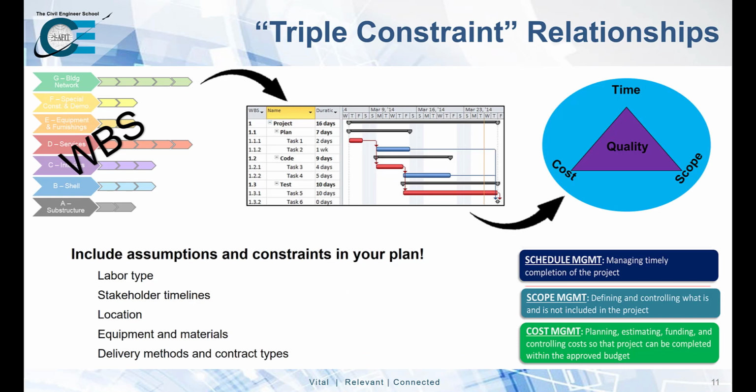The last item we will address in this lesson revolves around how the competency areas of scope, schedule, and cost relate to one another. These three competency areas are commonly referred to in the project management world as the triple constraint. In the prior scoping lesson, a work breakdown structure was introduced to methodically break down project work into manageable chunks. This procedure is an effective way of identifying activities and capturing all the work and only the work required to complete your project. Once a WBS is established, the work of estimating durations and sequencing activities can begin.